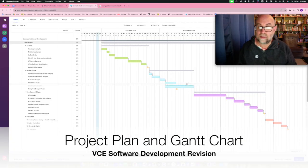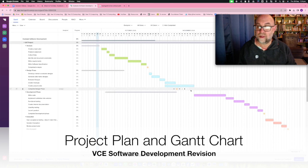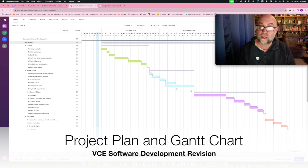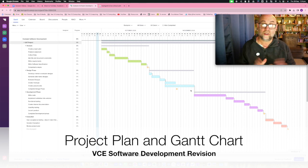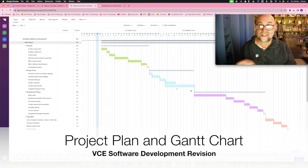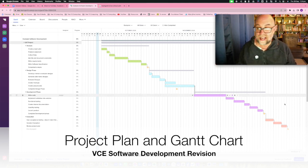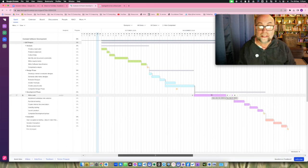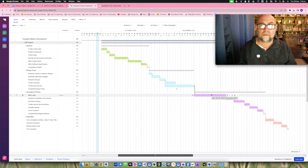There's no way of saying well if we only build part of the project then we'll have this timeline — that's not really what the project plan is for. If you make a change to your project, if you go back and say we're going to have a different scope, then there is a very good chance you are going to change the critical path. If you make a decision that you need something and you're down here in the project needing to get your programming done, everything could blow out from there.